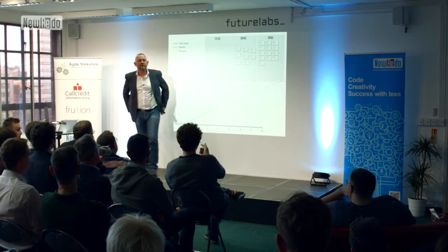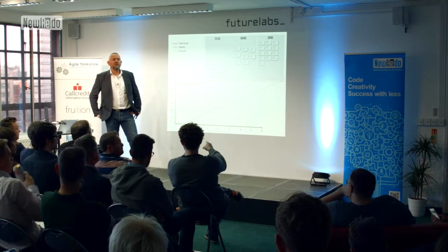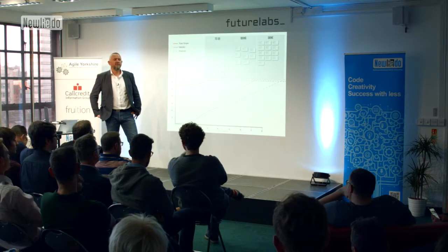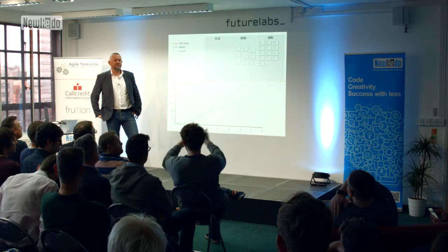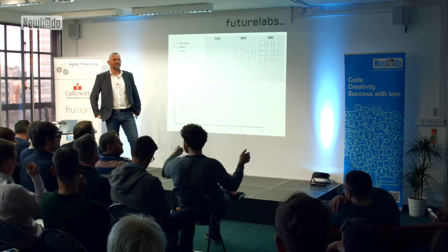I would just add that I think the issue with Gantt charts that you get away from with this style of planning is that the ordering of delivery is very flexible here. There's no implied ordering of when people are going to get a specific feature, because that will frequently change as you go through and as the engineering team faces challenges, identifies dependencies and learns about the work. Whereas with a Gantt chart, you've got this very fixed set of deliverables that will be delivered in the order that they've been defined in the plan.